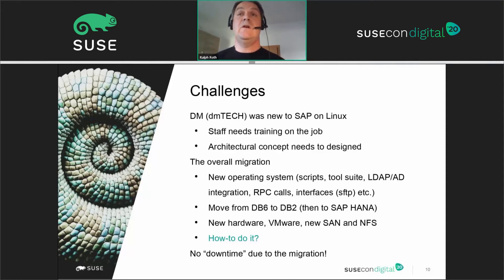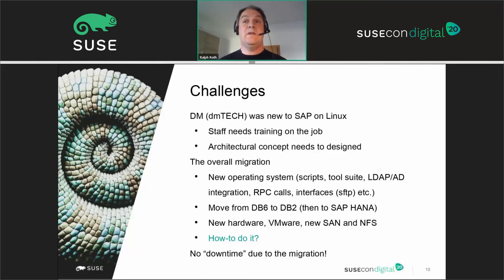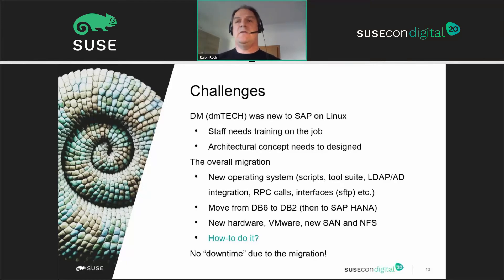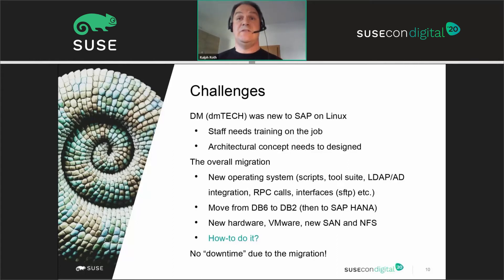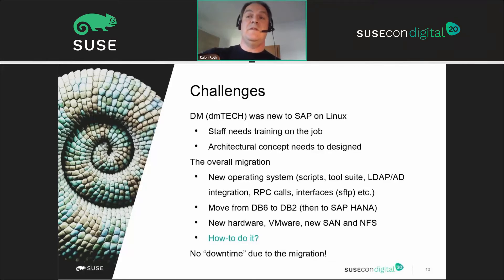The database move itself — from DB6 on the host to DB2 on Linux in the first step, and later to SAP HANA. There was also completely new hardware to deal with. They used VMware as the hypervisor, so that was another new challenge. Network and storage infrastructure was all new. And the big question was how to do the migration at all, given that the business runs on mission-critical SAP — requiring essentially no downtime due to the migration. The challenge was to keep downtime as small as possible.